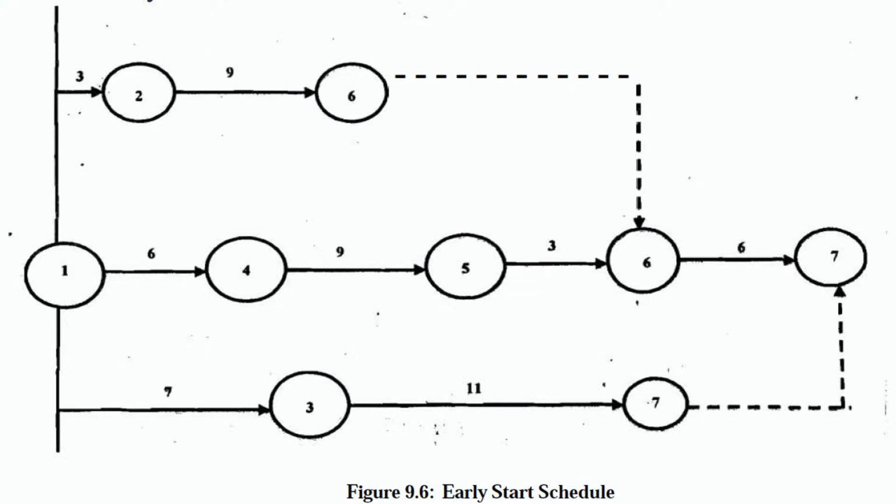The critical path is the one with no broken line. What you see, 1 to 4, 4 to 5, 5 to 6, and 6 to 7, is your critical path. In all other paths, which are not critical paths, you will find the 7th activity and a dummy activity, or dummy path, which is being shown to you.